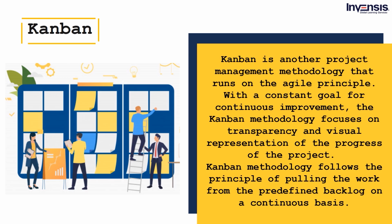Let's try to understand this with an example. In a conventional setting, an employee keeps getting 2 tasks a day and always ends up with more work in progress at the end of the week. No matter how hard the employee works, the work keeps piling up. Now the Kanban methodology takes care of this with a work in progress limit, where after a certain point, that employee won't be able to move any more work into the next stage unless he or she finishes other tasks.